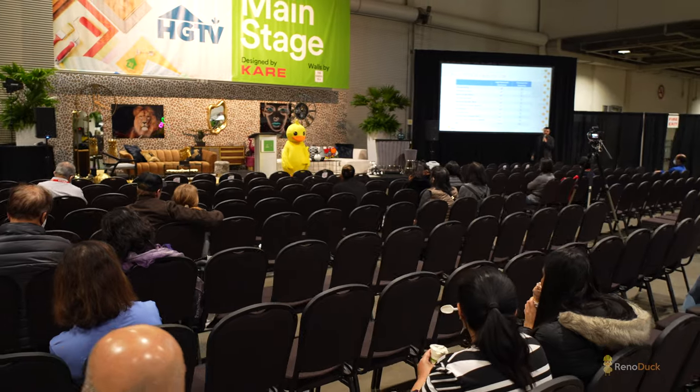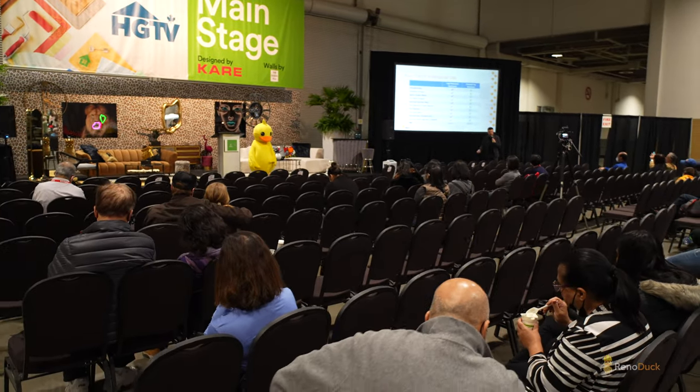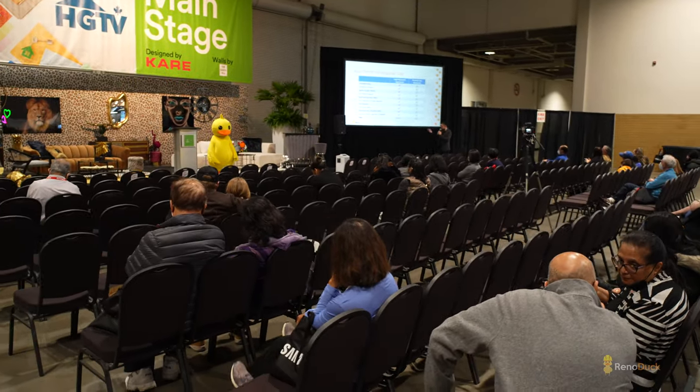There's only a couple of municipalities, Brampton, for example. Duct-mounted smoke detectors, fire dampers in the actual vents. So the idea behind it is you need to completely separate the basement from the main floor. So you're basically creating a duplex. And there's a complete separation with fire as well as sound from the basement to the main floor. You'll also need to upgrade your electrical panel to 200 amp. If your panel is 100 amps or 125 amps or 150 amps, you'll need to upgrade that.